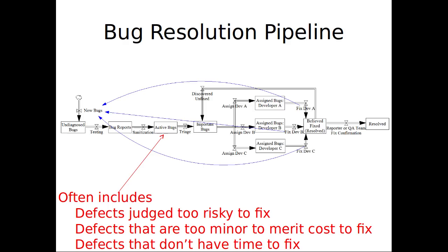Why might it be particularly important to be worried about the risk as that date approaches? This uncertainty, why is that particularly important? As you approach the deadline, as you approach the delivery. Because, ladies and gentlemen, if something goes wrong, you might not have time to fix it again. But maybe more to the point, you won't have time to know that something went wrong because you don't even have time to test it thoroughly. So you are operating on a razor's edge. If you get something wrong, you may be rolling out blind, and there may be major issues that you're rolling out across your firm or to customers.